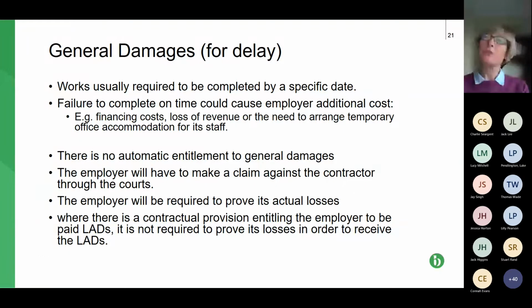Then that's the contractor's breach for not progressing. And then, of course, there are middle items where, technically, it's not necessarily anyone's fault. Ground conditions weren't as expected, the weather was bad, statutory authorities caused delay. So these are all neutral events, and typically the contract will deal with those. If it doesn't, then the general rule will be that the contractor is responsible for those items.